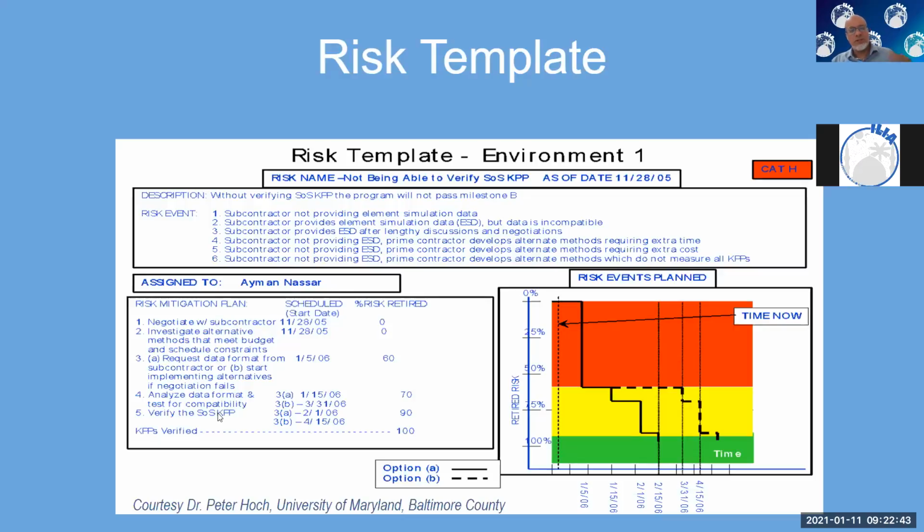You say, if that happens, these are the things we will do, or we will do these things to avoid it from happening. So for example, in the case of the crisis line I just gave, you would say, in order to avoid this risk, if a typo in the number could be a trigger for the risk, we're going to have 2 people review the phone number as it's entered into the system, prior to launching the new service. So that way you mitigate it, and you mitigate it by a certain percentage.